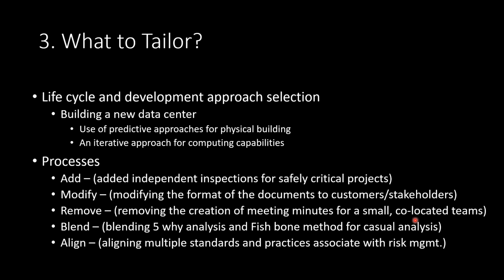Removing certain processes, like removing the creation of minutes of meeting for small co-located teams, right? A small co-located team may not need this process. You can eliminate that. You can simplify that.